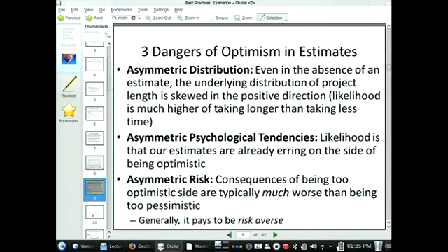So if you underestimate how long it's going to take, it's often a lot worse than overestimating by the same amount. Why is that? It's safer for your plan if you're waiting on something and it's finished early. Yeah. And if you're waiting on it because it's on the critical path for something else, then you just held back the whole project. So I think there are some good elements of that.